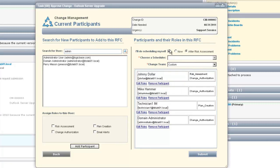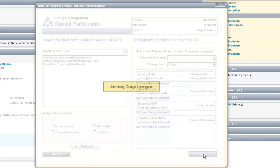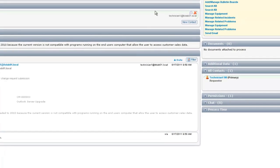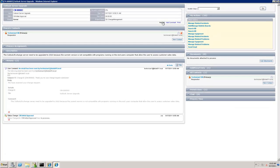Now we have three people on the change board: John Dollar, M Hammer, and Technician 1. We need to choose when the risk assessment and scheduling will be done — we're going to choose that after the risk assessment by the change manager. So we have our different change people: who's going to do the risk assessment, who's going to do the plan creation, and the rest are part of the change authorization or members of the CAB. Now we submit this request and continue with the approval process.